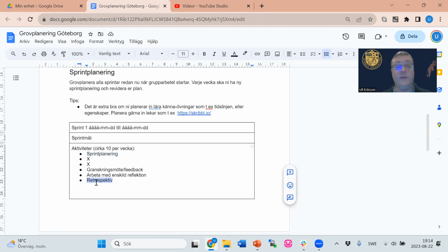In this special occasion, when you have 3 sprints ahead of you, I need you to plan all the 3 sprints at once. I need you to do it now. So I need you to plan the 3 sprints now already from day 1. In reality, we make a detailed plan for 1 sprint at a time. But in this situation, I need you to have an overall picture of what you're going to accomplish for the first and the second and the third sprint. So I need you to do that now already.